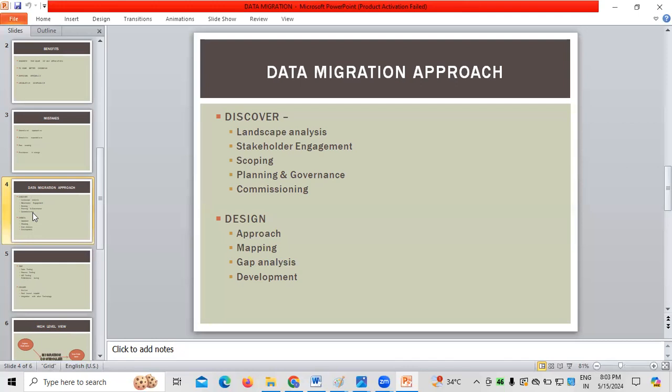You need to identify the stakeholders as far as engagement is concerned based on two things: power and interest. Whoever is having power, they will be having decision making authority. Whoever has interest, they will be having involvement, so they will be involved more. Stakeholder engagement is something being a BA you have to do based on the power and interest grid. Once we have identified the stakeholders, you need to do the analysis and management. Analysis and management means you need to analyze the stakeholder first and then manage the stakeholders.